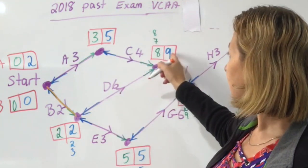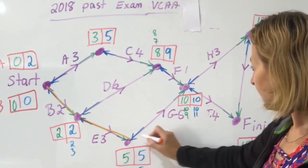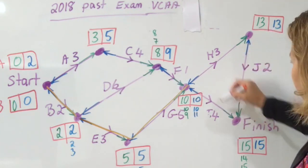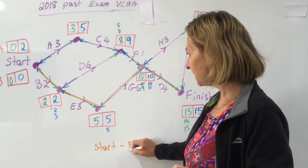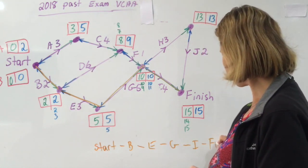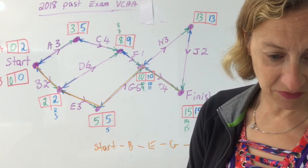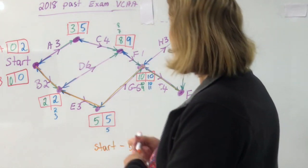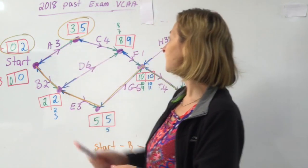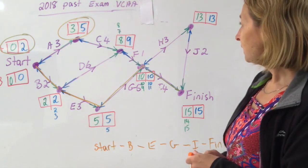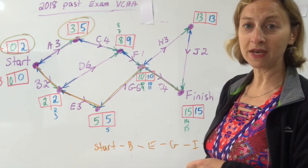Don't say 15, because that's when activity I is finished — it takes four hours, so the earliest starting time is after 10 hours. For Part B, the critical path is any path with no float time. Starting here, I can only go to B. From B I can't go up to C or along D because D has a float time, so I come down. My critical path is: Start — B — E — G — I — Finish. For Part C, two activities have a float time of two hours: those are A and C. Be careful — activity F has a float time of only one, not two.